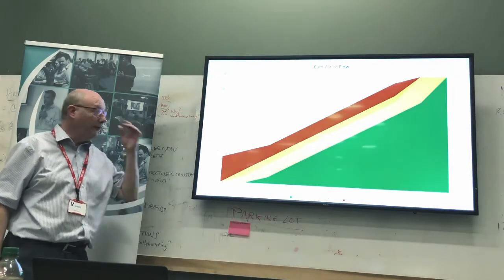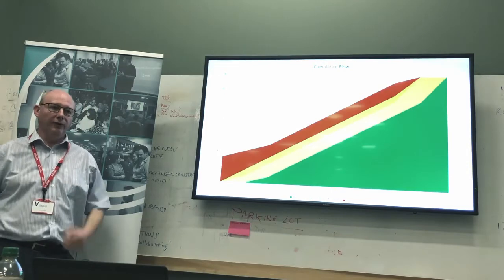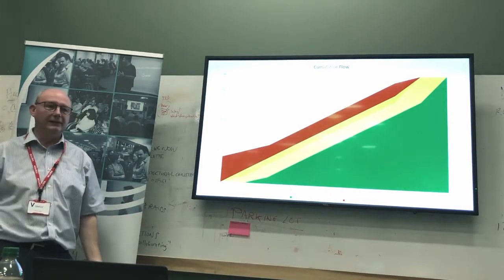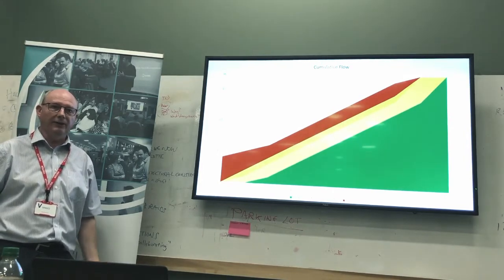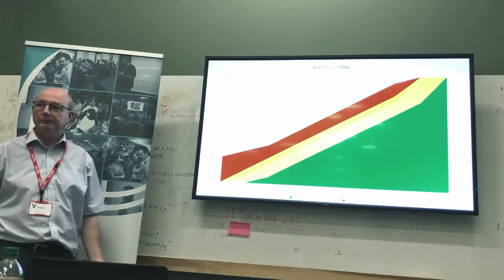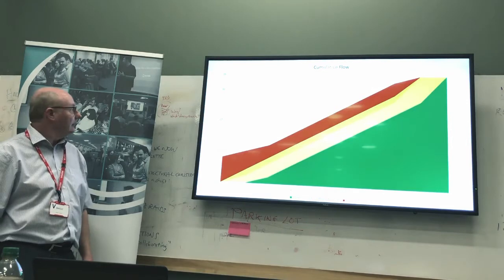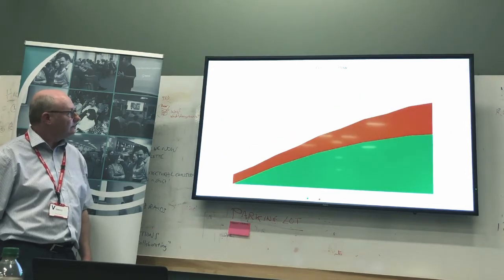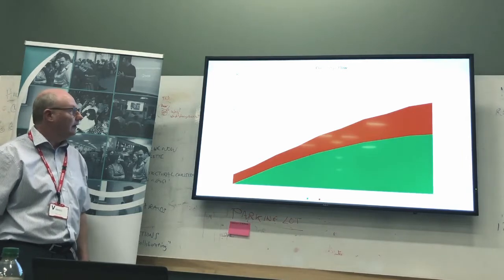But no, all of these are making the assumption that develop and test are 2 separate roles, because they're separate columns on the board. If you've got pairing and TDD, you don't need these to be separate roles or separate columns. So there's somewhere to try to get to. Yeah, so I was just pointing out these points where... I can never remember my own animations, even though there's a tiny thumbnail on the screen.